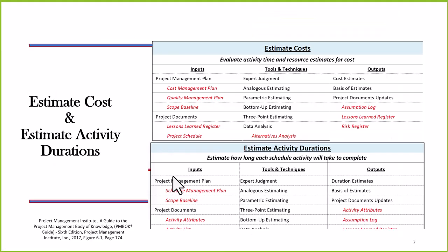So one of the first steps that we have to do in any project as we start planning the project specifics is to estimate the cost for each activity. How much is it going to cost? These costs are what the baselines will be made up of. The cost is also where we will manage our earned value to make sure we're spending in accordance with the plan and trying to understand how much value we have created in the project itself.